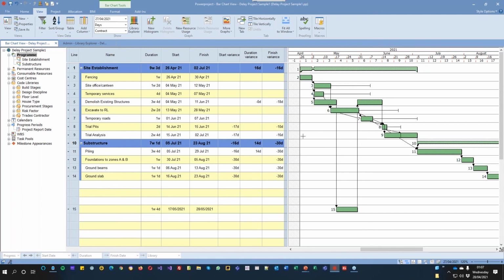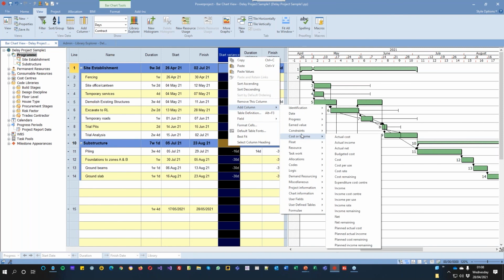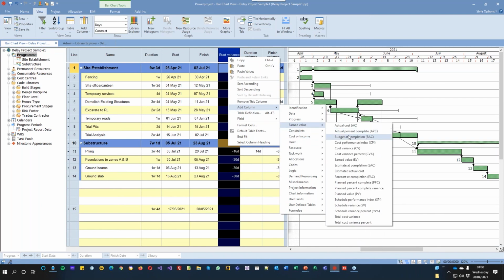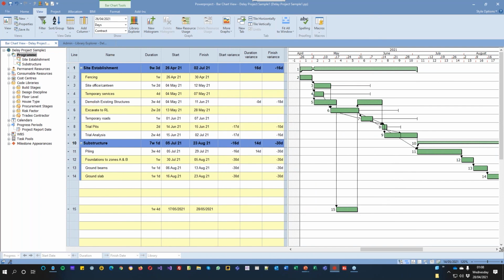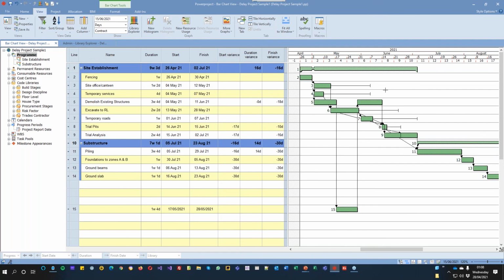And again, all of this we're looking at is just duration based, but the same applies to every column you have in here. If I had cost in here, here's my cost information where I can assign costs, but I can also, if I look at my earned value, I have cost variances, total cost variances, and schedule variances that I could do comparisons to as well. I can look at effort variance if I've got resources assigned and so forth. So it really allows me to look at everything.